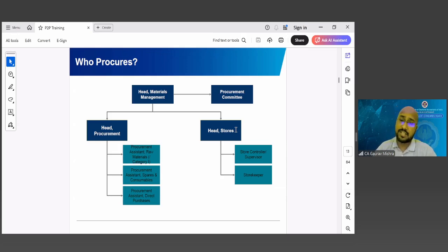And now coming to the next part, you will ask for quotations from various contractors. You will identify whether these contractors are regular in compliances like GST, TDS, PF, and all those things. You will understand their credentials in the past, if someone is new. And if some vendors are already doing these types of services within your company, then you will assess whether you can get the best rate or not. Based on that negotiation, you will define an agreement, prepare a normal agreement, and then prepare service orders, and all those things.